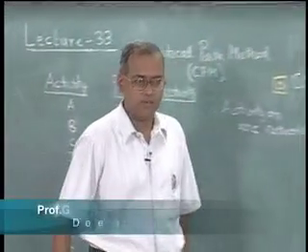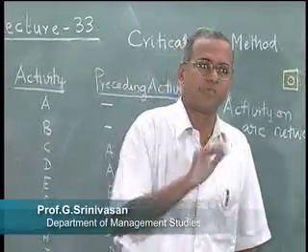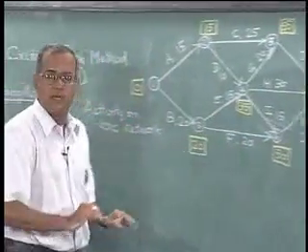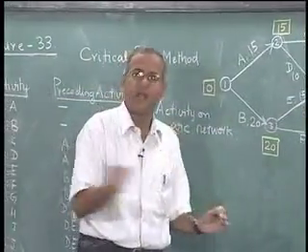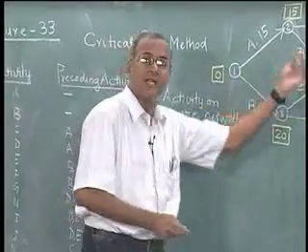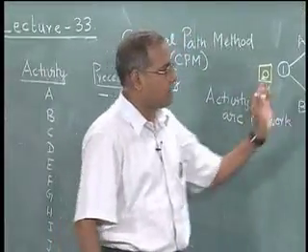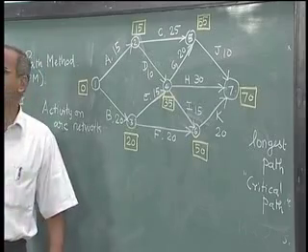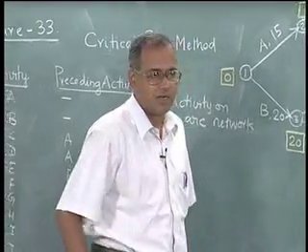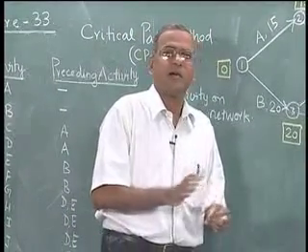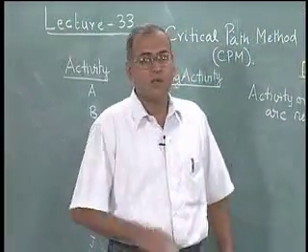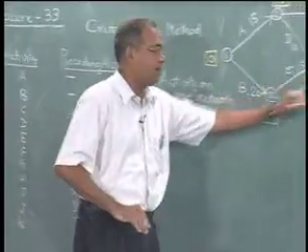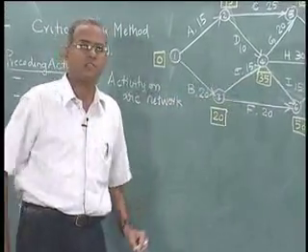of the network. A general problem of finding the longest path in a network is a hard problem, but networks with these kind of structures, where there are always arcs from i to j, j greater than i, a certain topological arrangement of the arcs, then the problem of solving the longest path is actually easy, and it is a modification of trying to solve the shortest path on the network. We had actually seen the shortest path on the network using Dijkstra's algorithm, where we followed a very similar labeling procedure, except that for every label we found out the minimum of the times to reach that point.